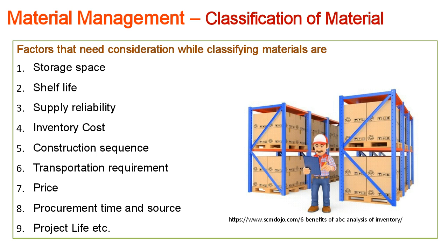based on which we'll be classifying the material, like storage space, because there are different approaches in material management. Like there is a Japanese philosophy of doing everything, I think you might have heard about it: Just in time, JIT. Just in time means they don't have inventory spaces or storing spaces. They will start doing the work only after receiving the order. Therefore there is no warehousing or material storing. They don't require a storage place, because they have everything in raw material form, and as they receive the order, they will work on it. So there is no requirement for a storage space at all.